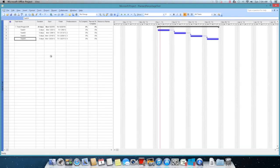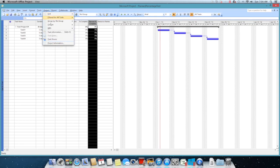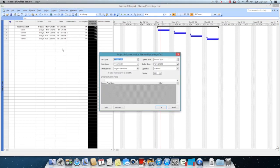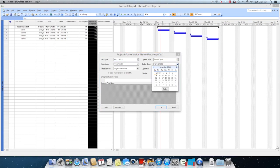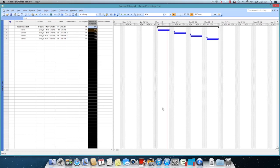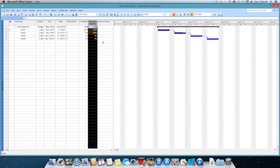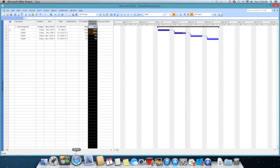If I want to see as of any day what's the planned percentage complete, I can go into Project, Project Information. I want to see as of fifth December. If I select fifth and say okay, you notice that the planned percentage complete is calculated as eighty percent. Let's see how these fields are created.